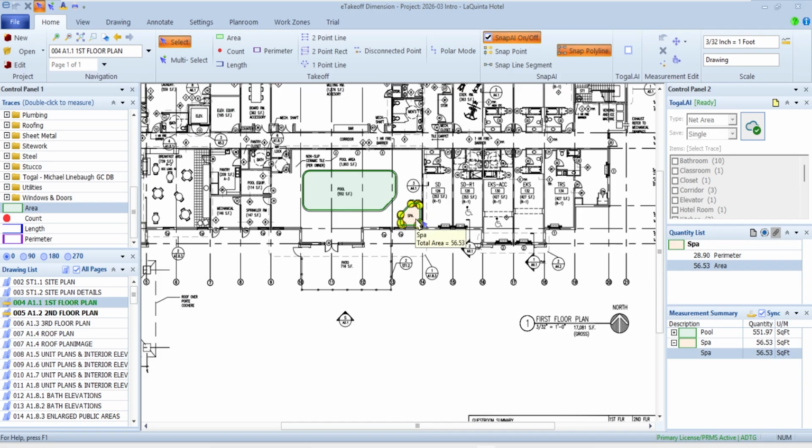So very, very powerful when someone goes back and says, well, where'd you find any vinyl in this project? Or where'd you find C1 in this project? Or whatever the case might be, it ties my estimate in with that print. So it makes it very easy to go back and tell where these different objects were found.